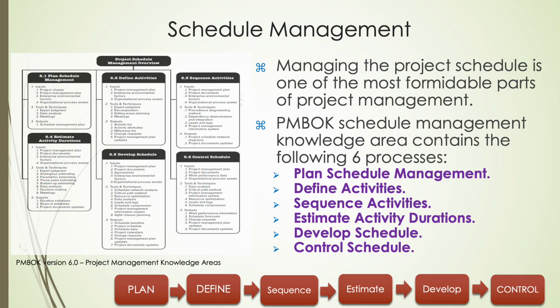The real challenge lies in execution and control. Control schedule continuously tracks progress against baselines, identifying variances through techniques like earned value management. Adjustments, reallocating resources, revising dependencies, or renegotiating deadlines, are triggered to realign the plan. Risks like delays or scope creep are mitigated through proactive governance, ensuring the schedule remains a living document. By integrating these processes, teams navigate uncertainties while maintaining momentum, ensuring deadlines are met without sacrificing quality or stakeholder alignment.